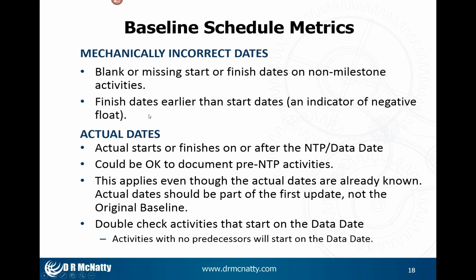Usually you don't want to have negative float in an original baseline. I have seen it happen though, so that's why I use the word usually, where parties agreed to disagree, accepted the original baseline that the contractor maintained could not be met, and they moved forward from there.